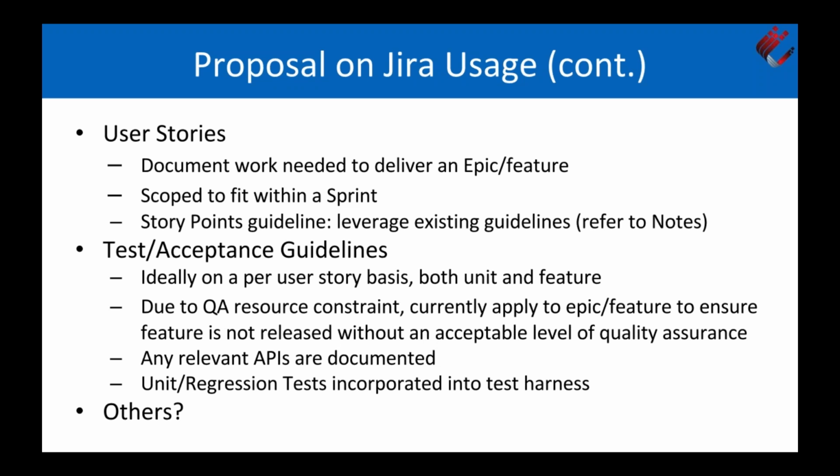There is a sort of problem with the idea of acceptance criteria, which is that we can't easily pull features out of the system if they don't meet the acceptance criteria. In fact, it blocks the entire release. So if we sign on to something like this, then we have to be willing to say, if it's not done, we're either going to strike this from the release. If we're going to call them acceptance criteria, we should be honest. Are they or are they not acceptance criteria? If they are, then we should be able to delay the release indefinitely until those criteria are met.